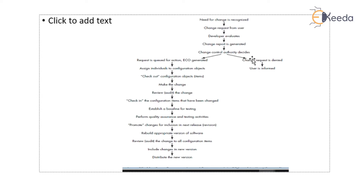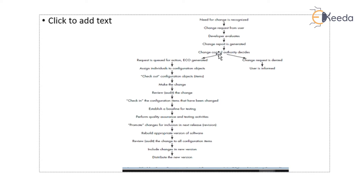This can be explained with the following diagram. The need for change is recognized. The change is requested from the user. The developer evaluates it. A change report is generated and forwarded to the change control authority. The change control authority decides whether the change has to be incorporated or rejected. If the authority decides to reject the change — finding it unsuitable or not important — the user is informed.